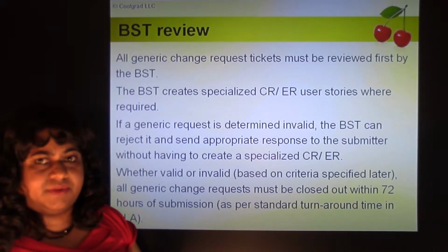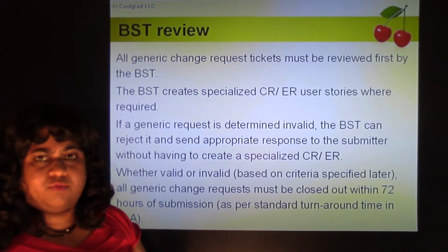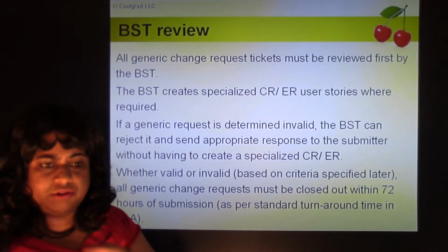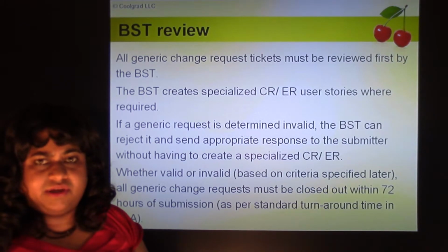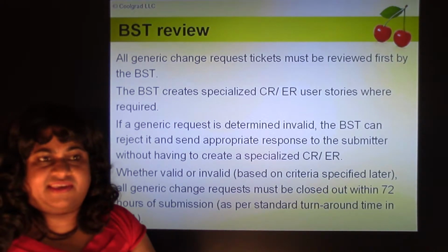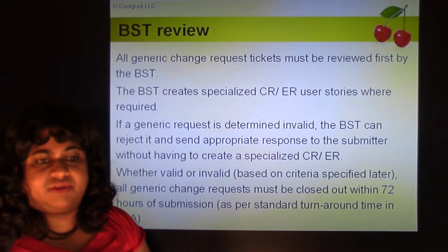So whatever CRs come in, they have a standard turnaround time. Within 24 hours or 48 hours, all the CRs must be attended to. Either it's marked valid or invalid. So the BST has these rules according to which they must function.